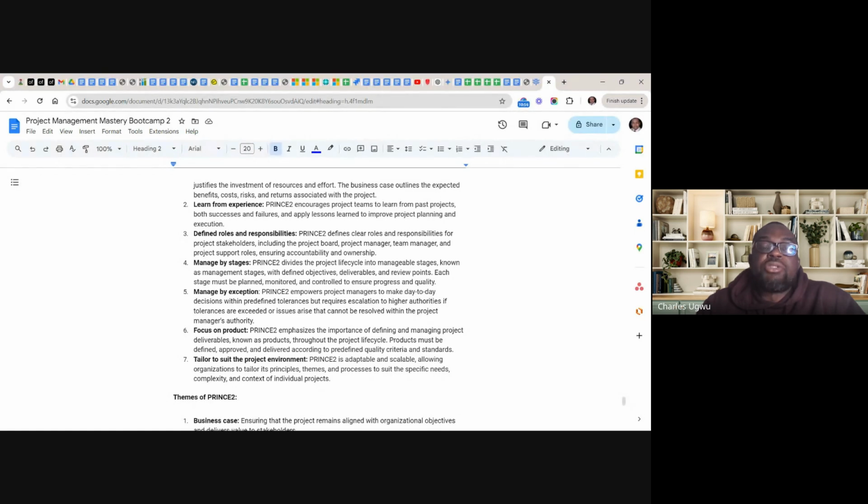Manage by exception. PRINCE2 empowers project managers to make day-to-day decisions within predefined tolerance, but requires escalation to higher authority if tolerances are exceeded or issues arise that cannot be resolved within the project manager's authority. And this is where the project managers become the king. They are empowered.